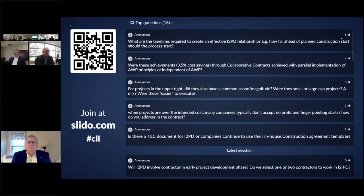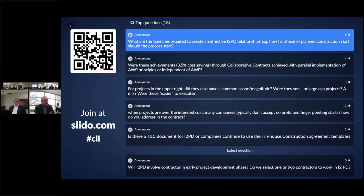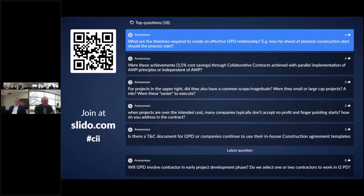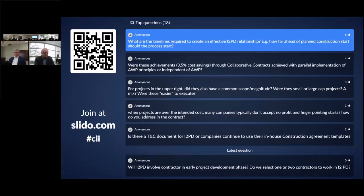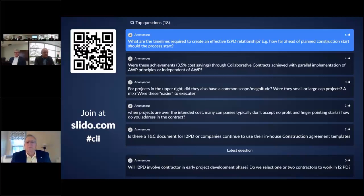The question is: what are the timelines required to create an effective I2PD relationship? How far ahead of planned construction start should the process start? That's a good question — it's in Alison's presentation this afternoon, so I don't want to steal her thunder. But what I will say is that you can start the I2PD process before your scope is fully developed. Once a contracting model has been selected by the owner, it's very difficult to reverse that course — getting internal consensus to reverse course is a lot more difficult than taking a look at your present project portfolio.